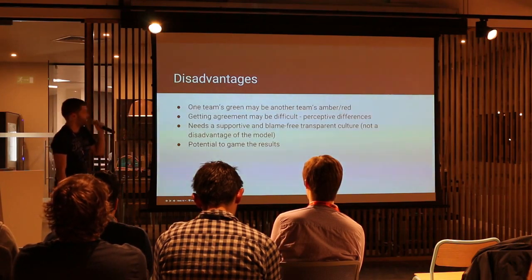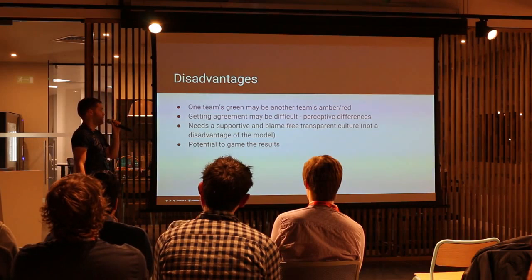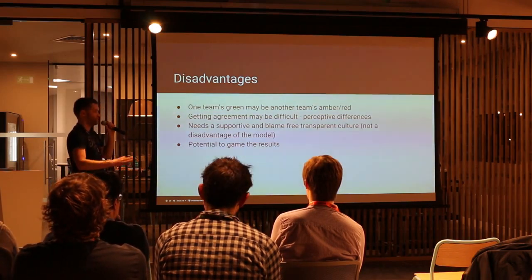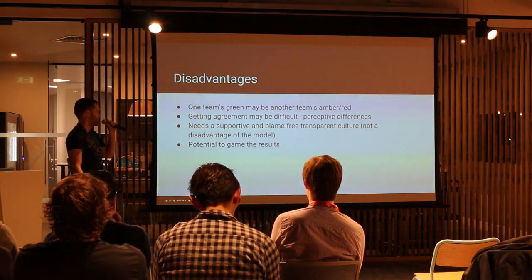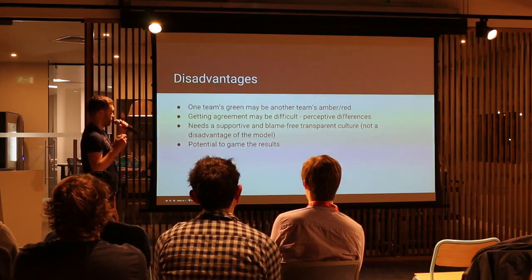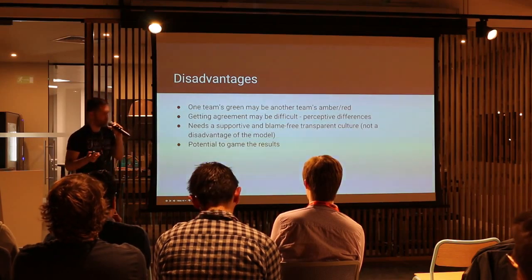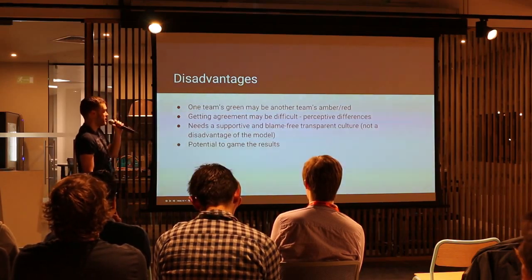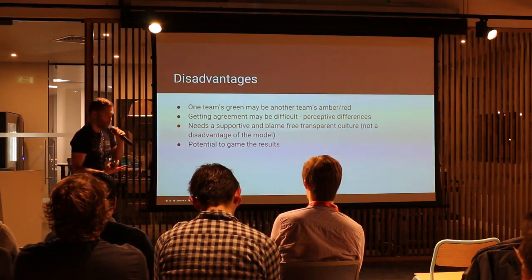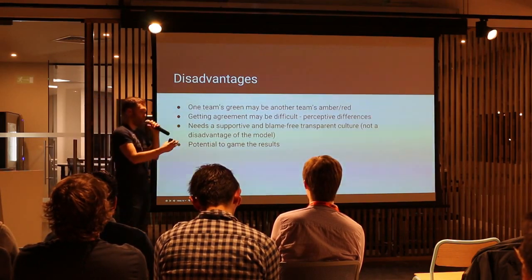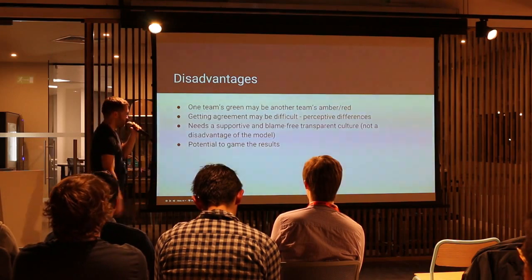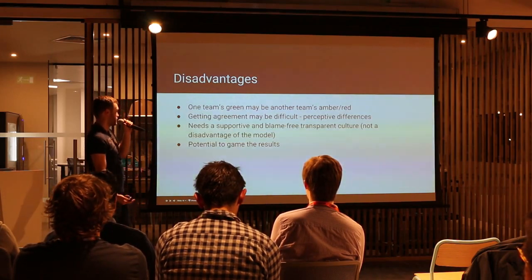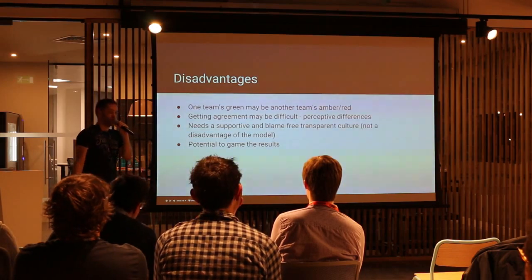These are the disadvantages: one team's green might not be another team's green — it could be amber or red for another team, so you're not always comparing apples with apples. Getting an agreement can sometimes be difficult due to perceptive differences. And most importantly, it needs a supportive and blame-free transparent culture. This isn't a disadvantage of the model itself — it's just something you have to have in place. If people might be held accountable when a red shows up, that's something that needs to be worked out before running these sessions. And there's obviously the potential to game the results, but again, that's probably a cultural thing.